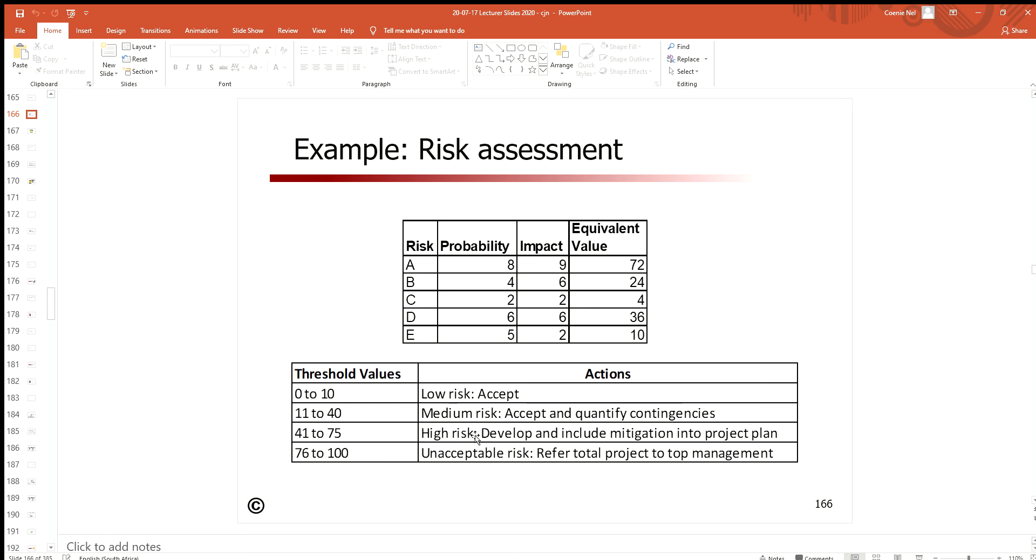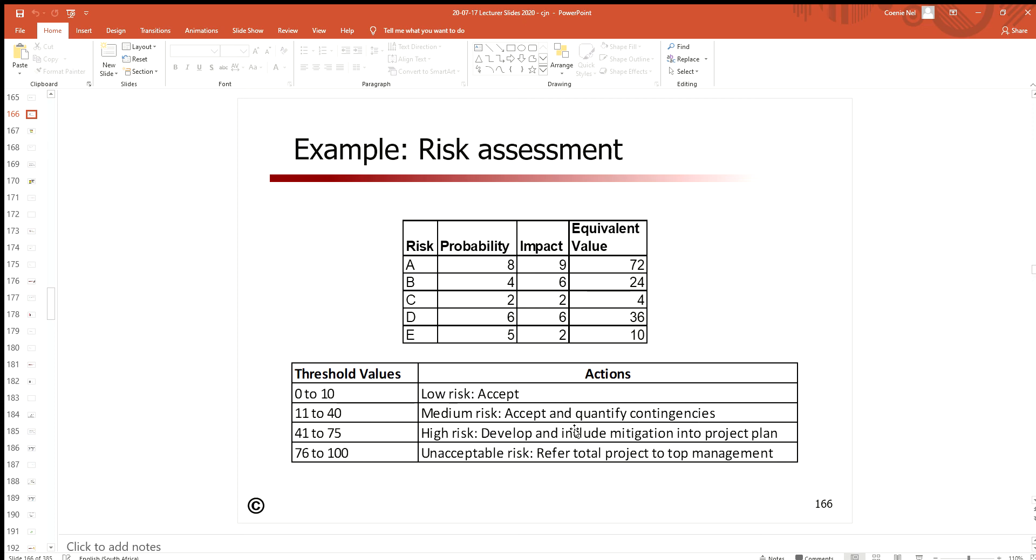So you're going to say risk C is 4—falls within that band, it's a low risk, I'm going to accept that. Let's take risk D: D is 36, it falls within that band, so I'm going to quantify a contingency.